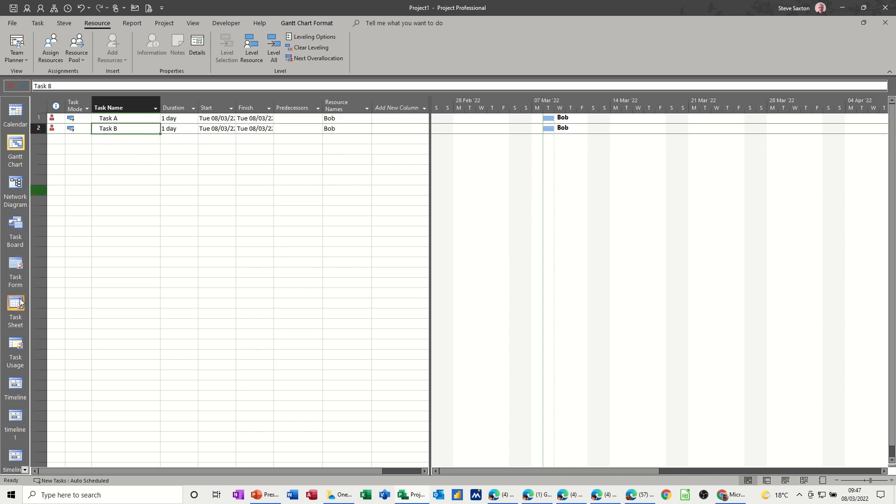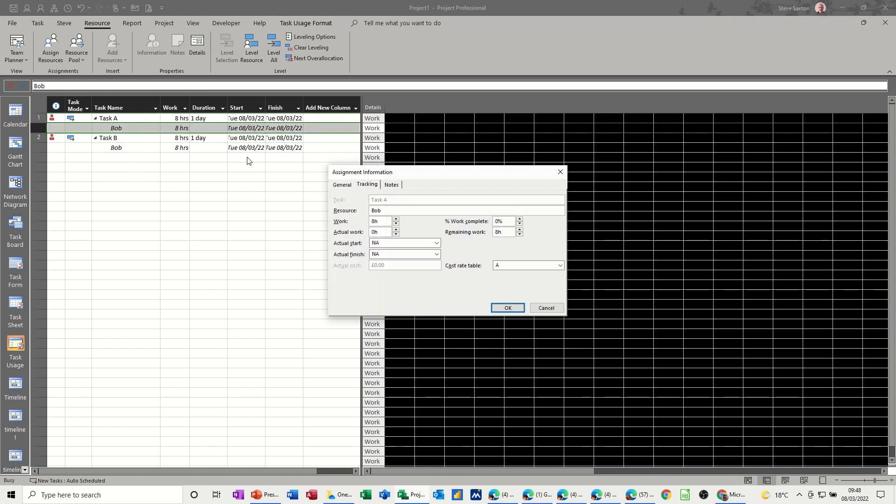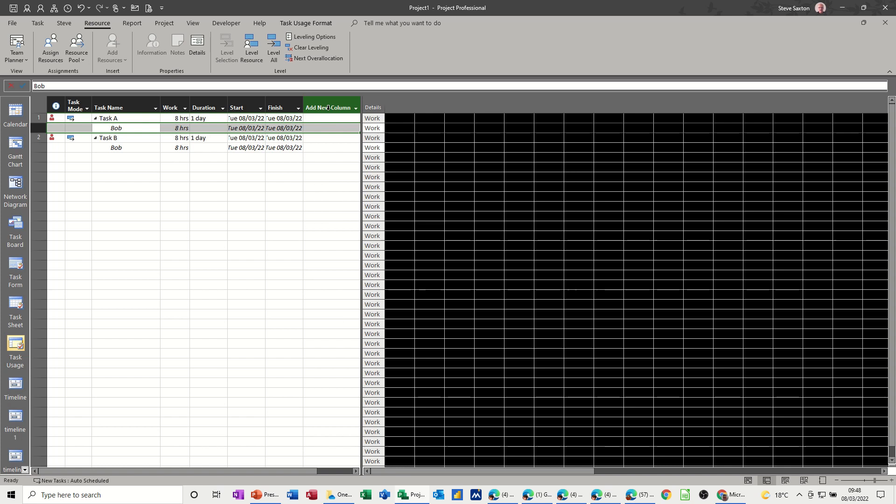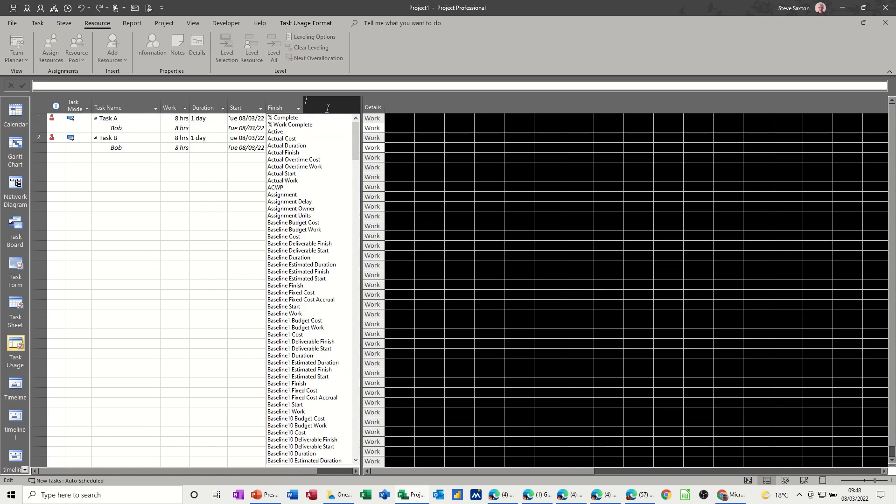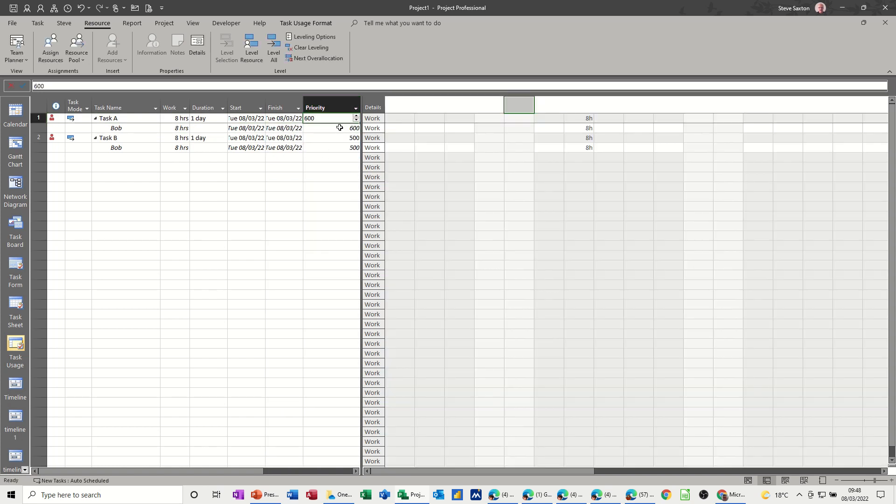Now if I go down to task usage, in task usage when you double click on a resource, you can see the information there. It doesn't actually tell you what the priority of the task is, because this is the assignment information. So if you wanted to see the priority in this view, you would have to insert that column. So if I do that, if I just type P to get to the P's and then click on priority, you can see that priority there.